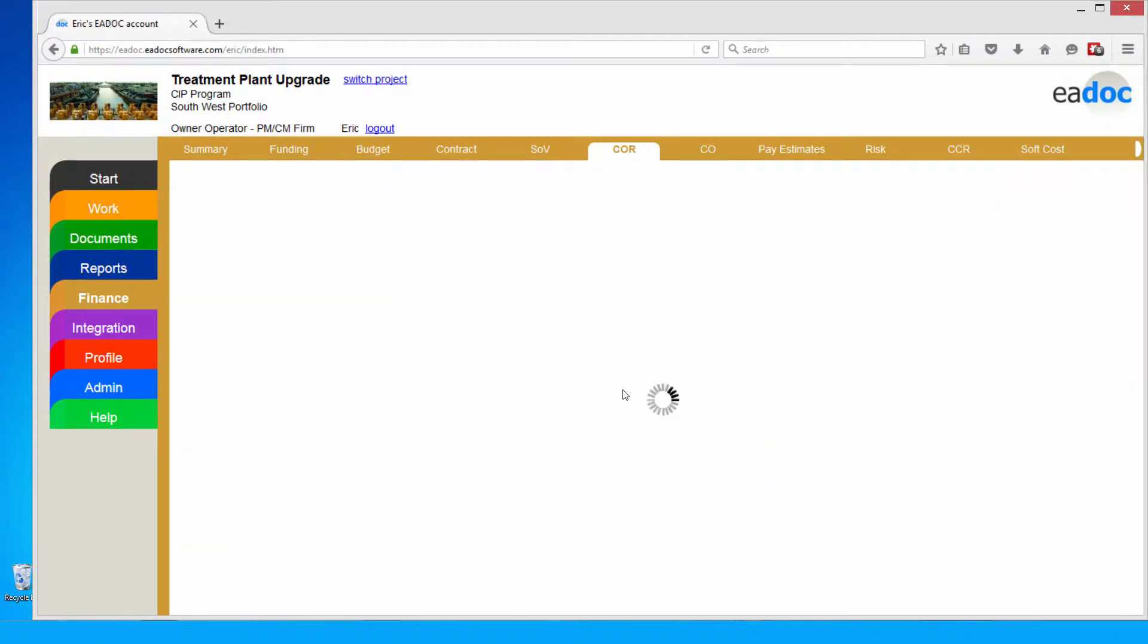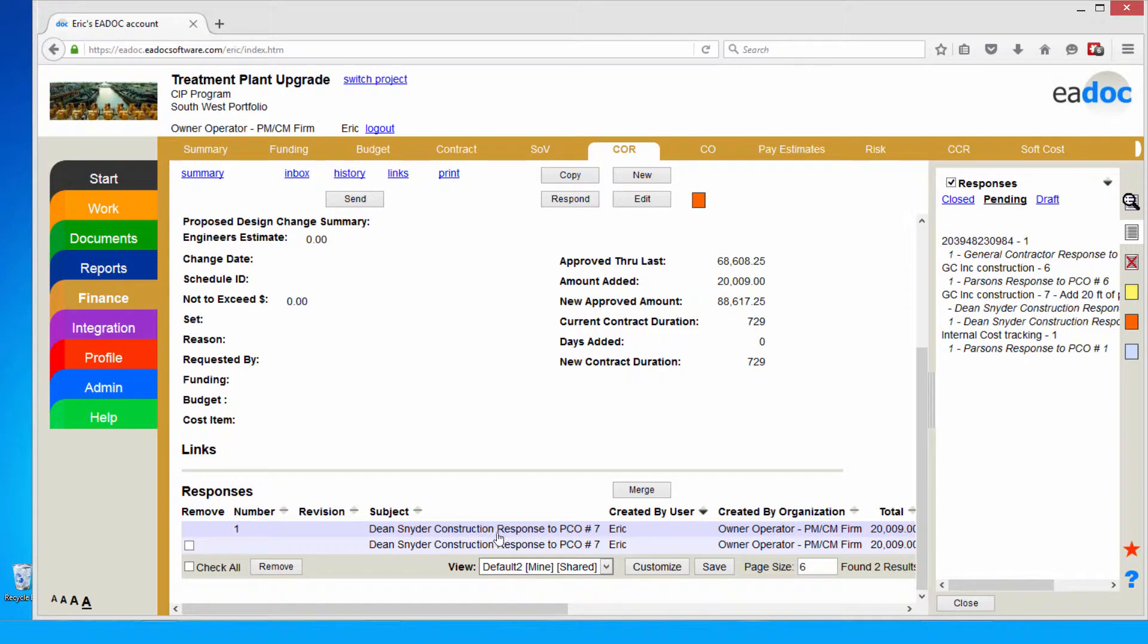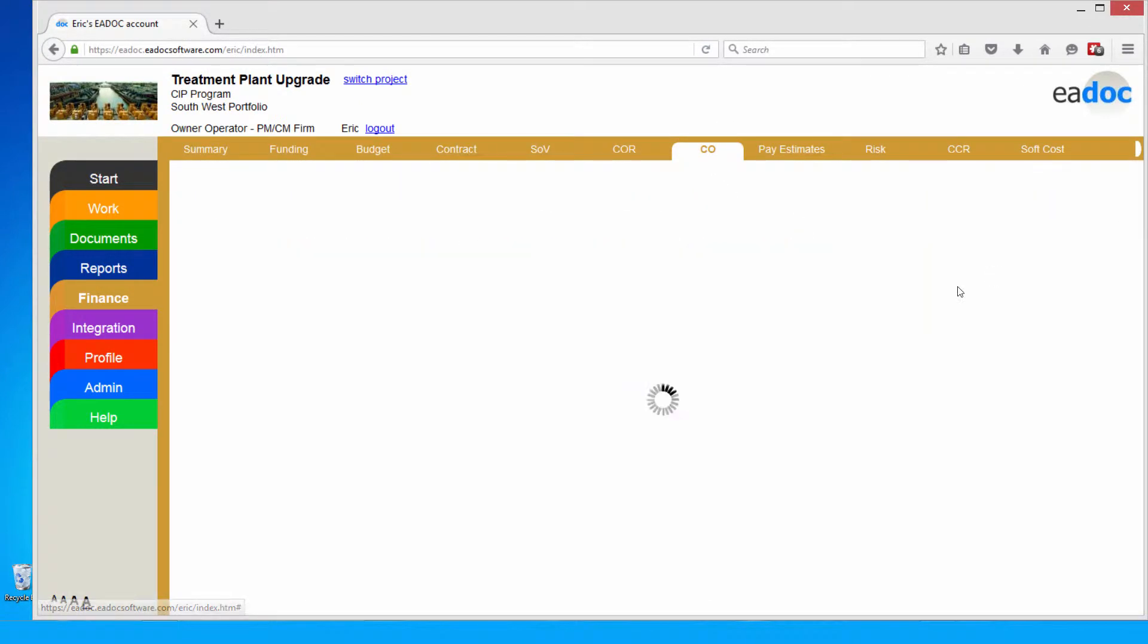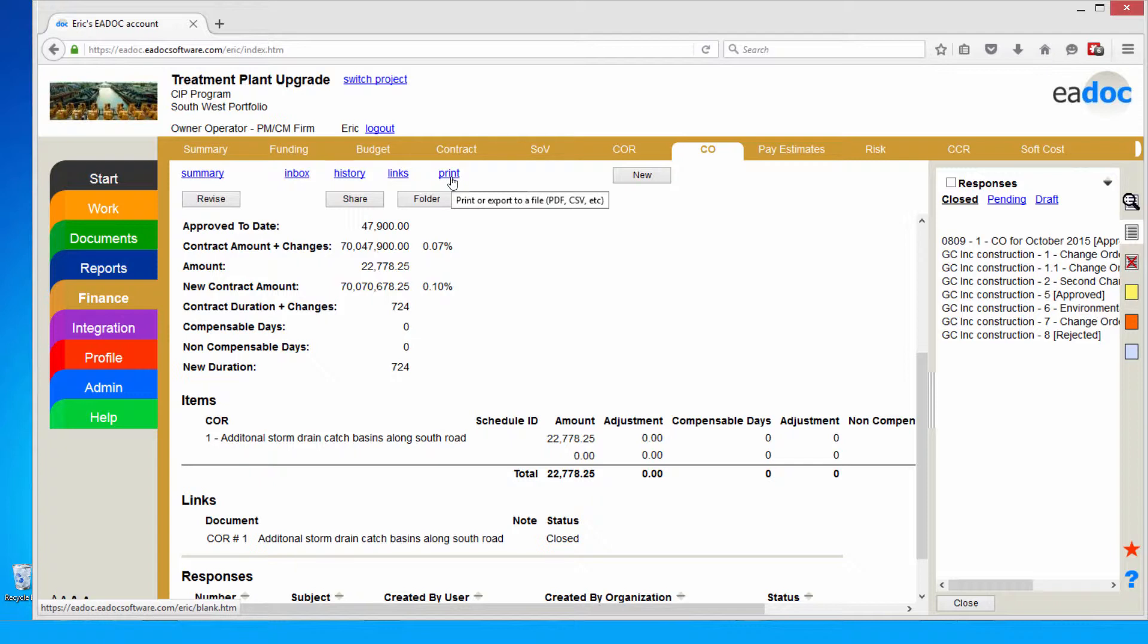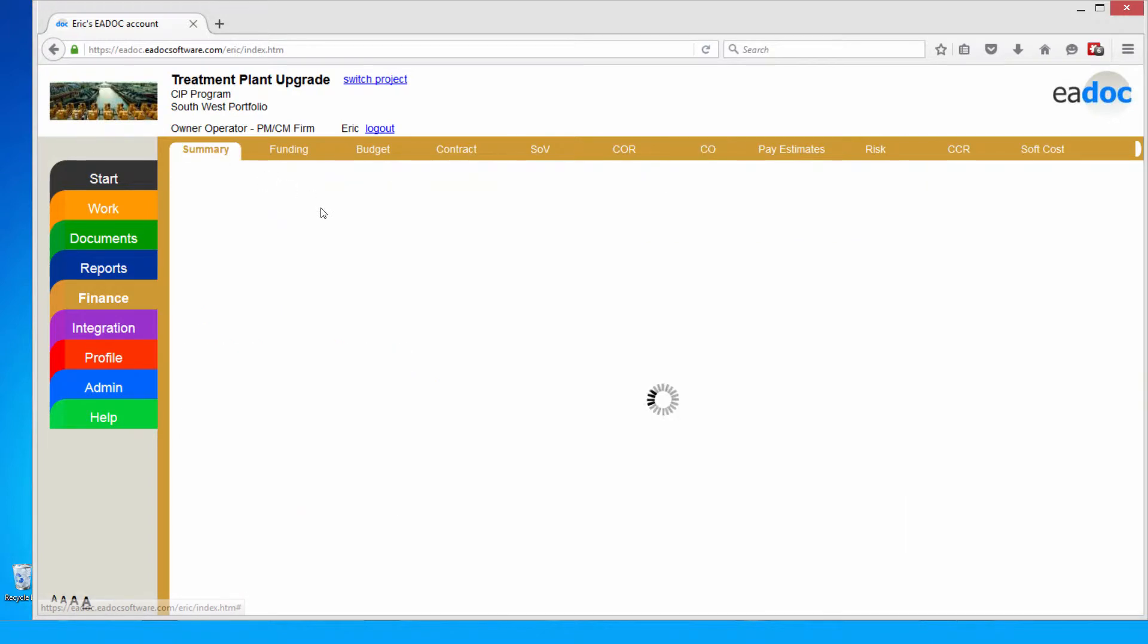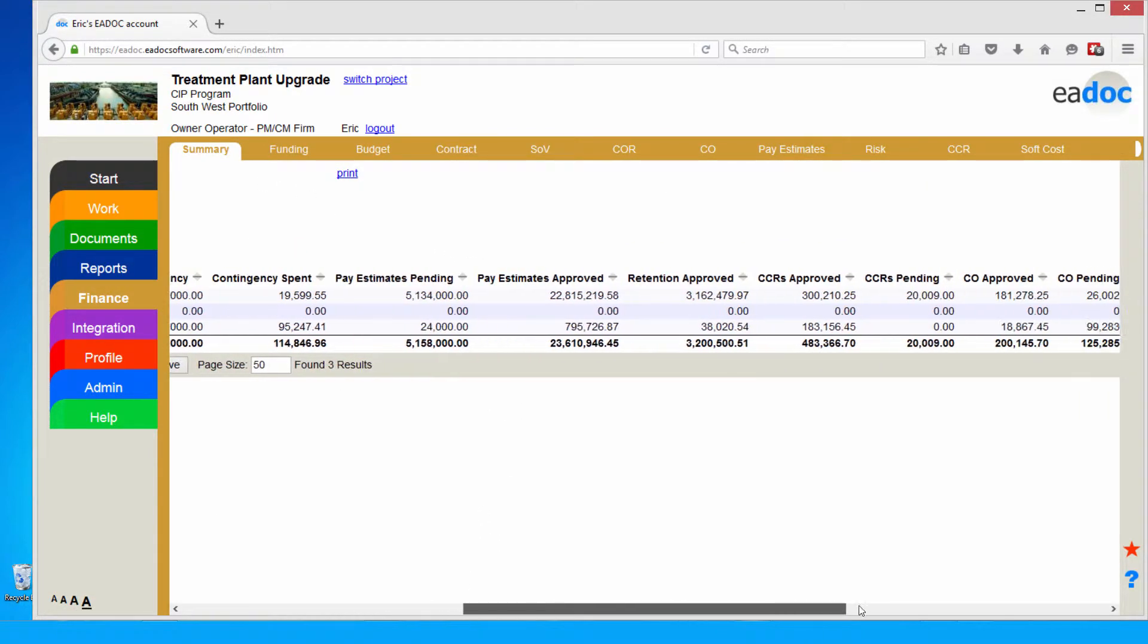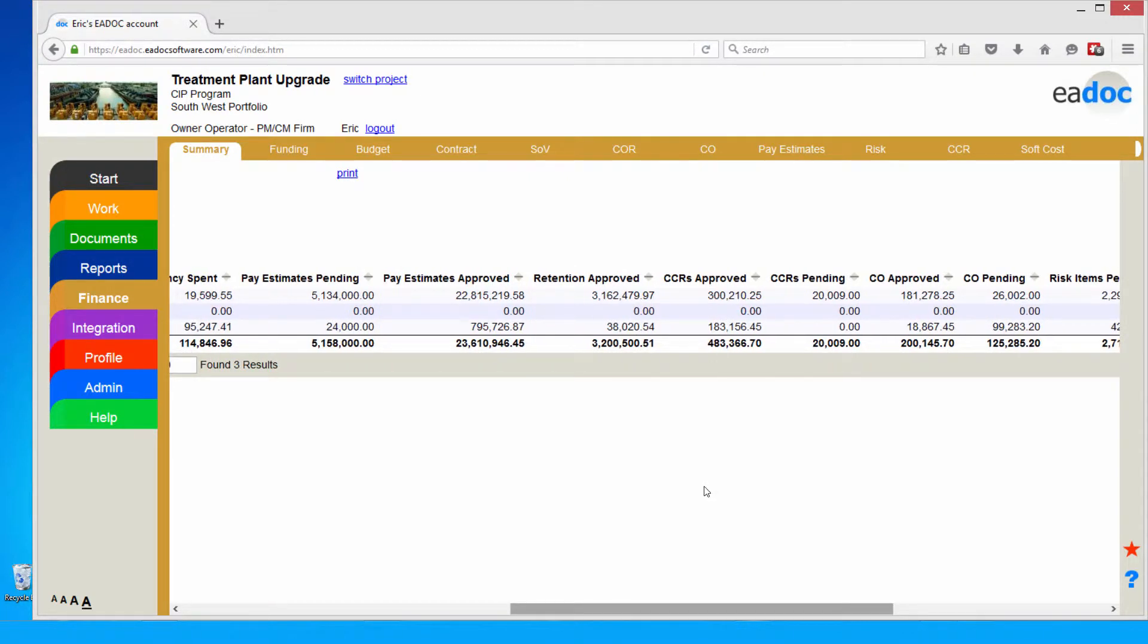Using our collaborative workflow engine, this is a collaborative process with the change orders. Depending on your process, we can configure the system where the change can be initiated from a contractor. It can come from a designer, the client. Then you can capture the scope of work and the cost proposals for that particular change or scope of work. Once I've captured that cost here in the system, then if I need to, I can run it through a two-step change order process where I can roll my cost proposals up into the formal change order. I can route these around for electronic signatures or I can print them out on AIA or EJCDC or consensus docs forms. There's a lot of flexibility with these printouts. We can even do them for individual clients as well. This way I can go from digital signatures or if I'm still using wet signatures I can print out on the form I need. The key benefit here is all this activity is occurring in the application so I can see real-time exactly how my projects are performing. Things like pending change orders, pending pay apps are all managed here in the system. For me as a project manager, all I have to do is review and approve. I don't have to re-key in the data that's coming in from other project participants. I can see real-time exactly how the financials of my project are performing.